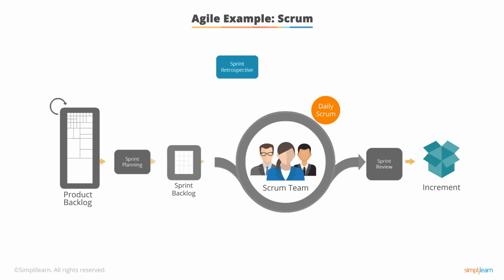And what the Agile team or the DevOps team, anybody who's touched the software, will do is get together and examine what happened and figure out how to improve the process and how to improve the work practices so that indeed the next sprint will pass. And this might mean actually reducing the number of features to be implemented in a sprint, or it might mean introducing automation techniques, a whole lot of stuff.